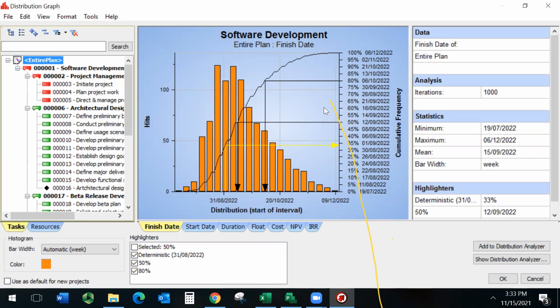That's our theory, and we've been talking about that for a while now. So if a task has a 100% criticality index, it means that during the Monte Carlo simulations, no matter how the task durations varied, the critical path always included that project activity. So that's one thing to know about this.